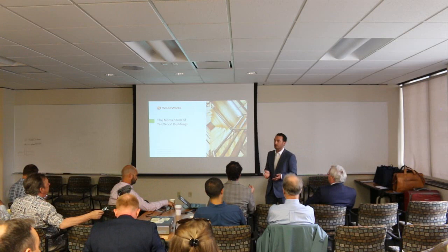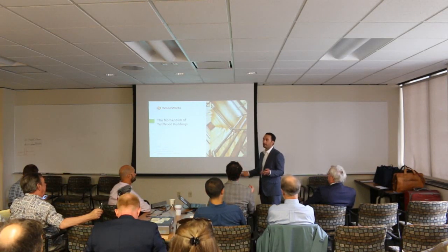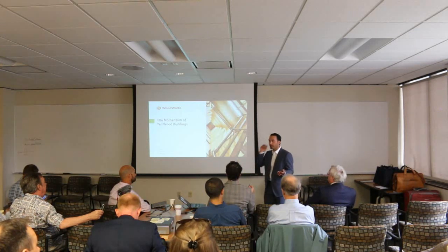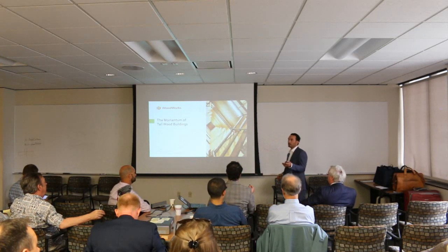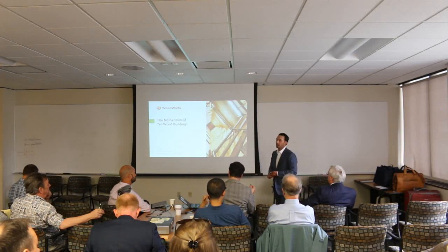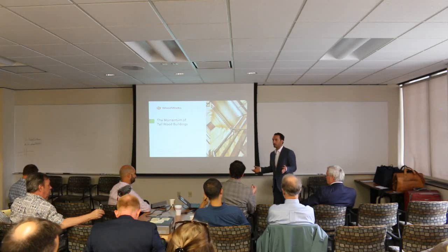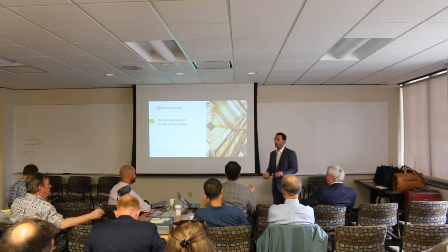In fact, a lot of manufacturers can ballpark it. For example, for a warehouse, they can tell you off the cuff, 5 layers is probably the way to go. And they can tell you on a V2M1.1 series of panel, and they can help you with costs. So it's a pretty easy cost comparison there. You don't have to do a ton of upfront work. You don't have to complete your design to do that cost comparison.